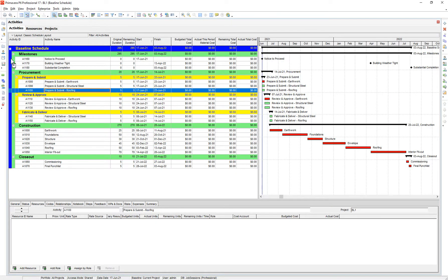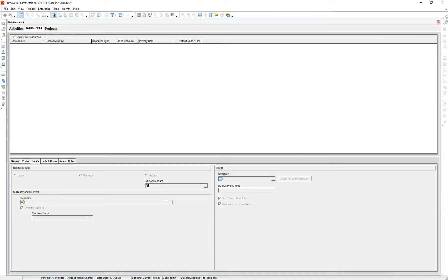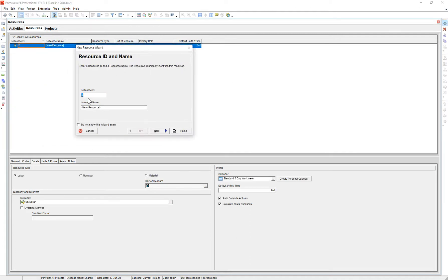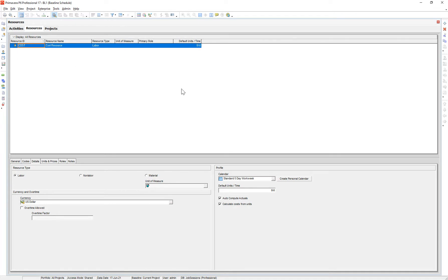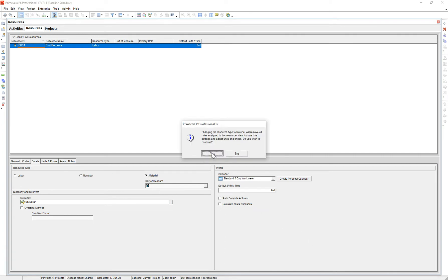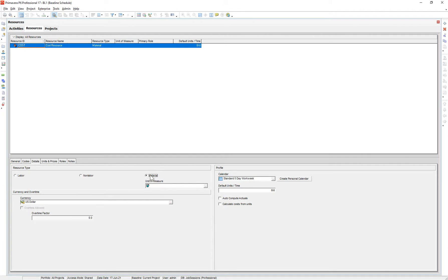First, what we have to do in our P6 file is create a resource that we can assign to the individual activities. So we go to our resource library, add a new resource — I'm just going to call it "cost resource." A couple of settings I'm going to uncheck: calculate cost from units and auto-compute actuals. I'm going to make it a material resource. These settings are for if you want to automate actual costs based on percent complete during your updating process — maybe I'll go into that in another video. For now, let's just uncheck those and make it a material resource.